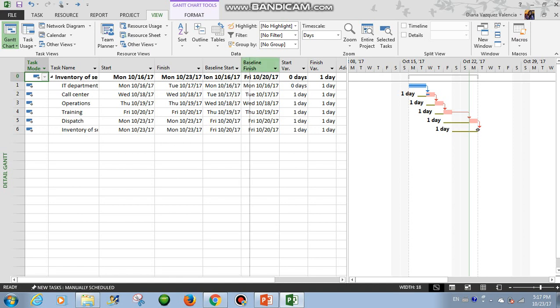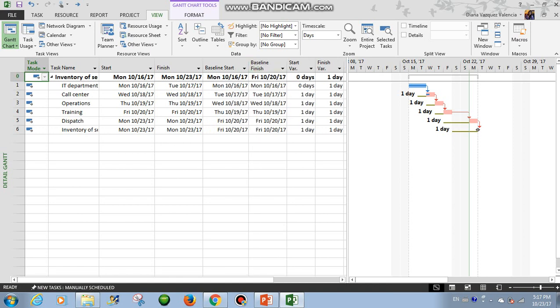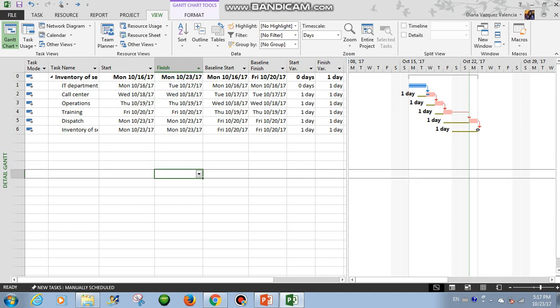So as you can see here, for example, IT, it's supposed that we had to finish on Monday, right? Baseline finish Monday, but actually we finish on Tuesday. And for call center, for example, the baseline value was finished on Tuesday, but we are finishing on Wednesday. Okay. Now let's see the last method.